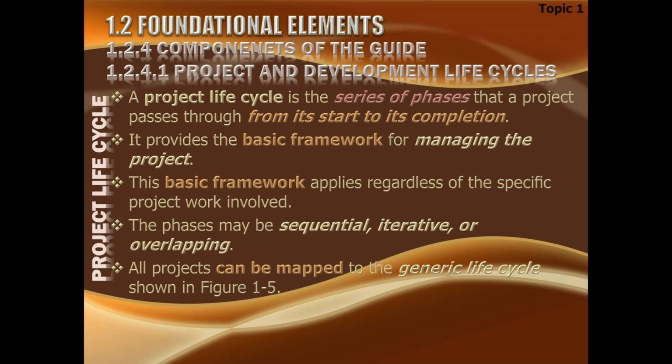Then we got carried away, so I want to listen to the actual answer, what would be the ideal case in that scenario. But as far as WBS is concerned, you can create a WBS, but at a certain time, why have you split your project into multiple phases? Because at that point in time, you don't have that information. You don't have the activity breakdown. Exactly. You don't have the activities that you are planning in maybe the fourth phase. You are in phase 1. Exactly. What you will be doing in phase 5, you don't know. Wonderful. So you cannot plan a WBS. So what would be the answer?